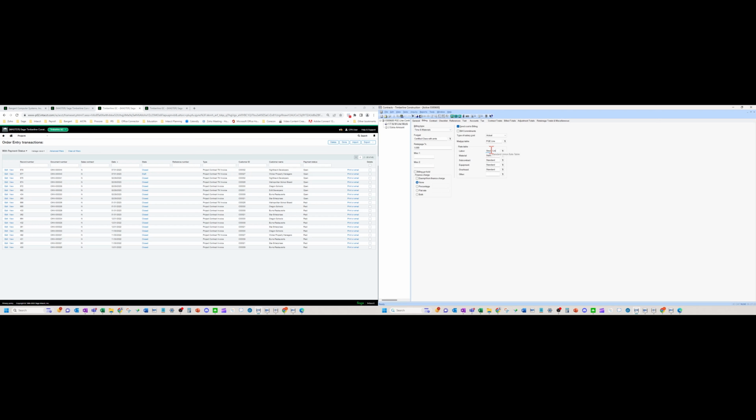So first thing in Sage 300, you have a time and material billing type, you assign your rate tables. Okay, so if this contract goes over a fiscal year and you want to change or increase your rates, you have to come in here and change them, at that specific time when the change needs to happen. So these have to stay on until the old rates need billed. And then you have to remember to come in here and flip them to the new rate table. Okay. So kind of cumbersome to do that on these time and material billings.